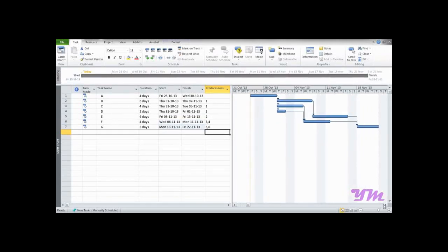So now if we want to look further, yes, we know that activity B is after activity A. So if we look at the relationship, activity B, which is this one, starts once activity A is completed. So the relationship is finish to start, which means after activity A finishes, activity B starts. Now if you want to put some time interval between both of them, between the finish of the very first activity and the start of the very next activity, that is generally referred to as a lag in project language. So if you want to enter the lag, it's quite simple.